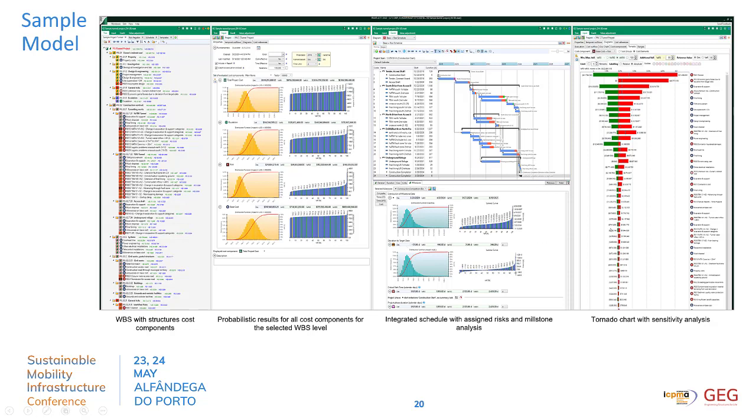The last part on the right side is a tornado chart which depicts the sensitivity of the biggest risk in the project, and it shows you how risk can change the cost or the completion date in your project. And of course you should use such diagrams to pick the risks you want to mitigate or change using mitigation measures.